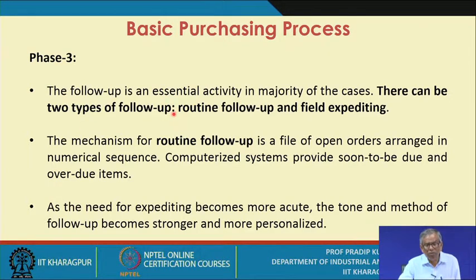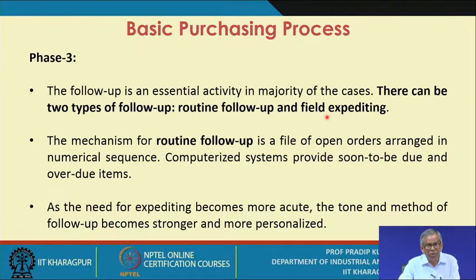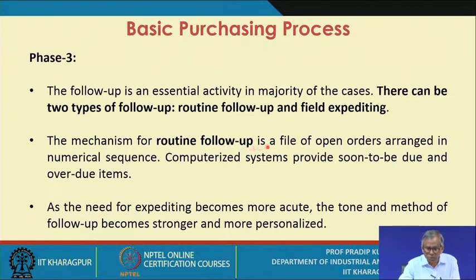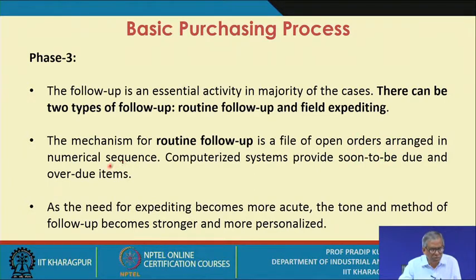There can be two types of follow-up: routine follow-up, and the second is referred to as field expediting for important orders. For field expediting, especially with sole sourcing, when it is a very important order you do not want to take any risk of non-supply at the specified time. The mechanism for routine follow-up is very simple — you create a file of open orders, which is a very common occurrence in any purchase department, arranged in numerical sequence.